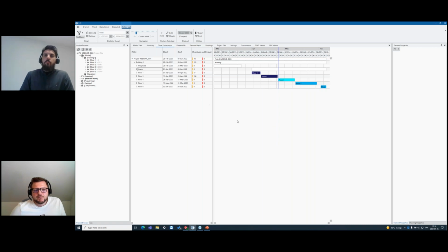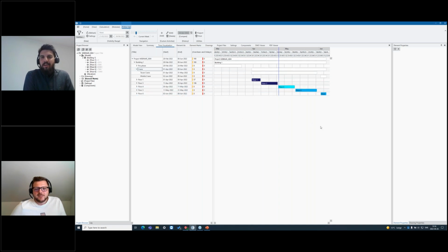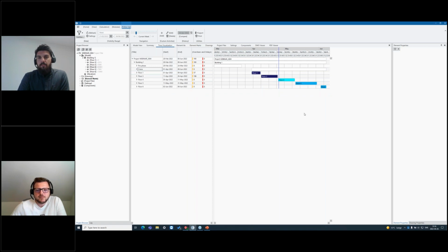You know what you just showed, right? It saved a bulk load of money for the company with the crane, right? Moving the crane only for 4 days, exactly on the time that we are predicting to finish the project. It's an enormous amount of money. So yeah, definitely. And it's a great example. It's very clear that, let's say, for some reason someone is postponing the erection of some elements here, then it's very easy to highlight that, okay, maybe I cannot do that because the crane is not available. So it's easy to follow that up. Yeah, exactly. So you hit the deadline exactly, so you don't exceed this date. 100%. Yeah, that's great. Super.